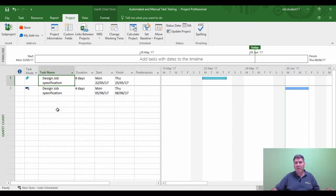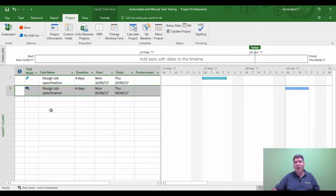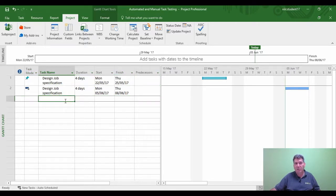This shows that if you go down the path of manual scheduling, there is more flexibility in using tasks to make your projects work the way you want. But it also takes away a lot of Microsoft Project's automated controls. Whereas with an automated task, you can use all the automated controls within Project, but you don't have quite as much flexibility. There are pros and cons, and this is a big decision at the PID stage — whether you go with auto-scheduled or manual-scheduled tasks.